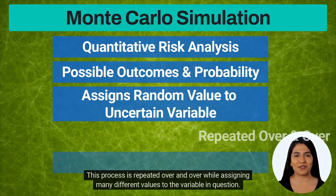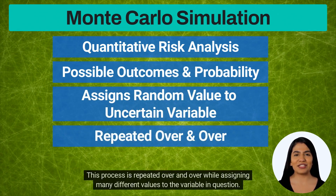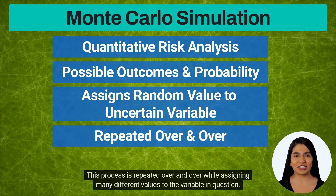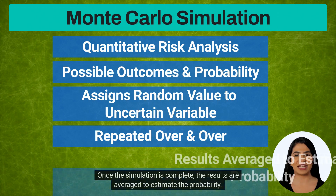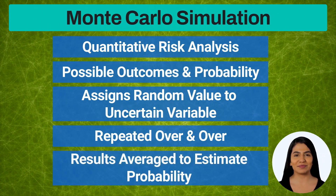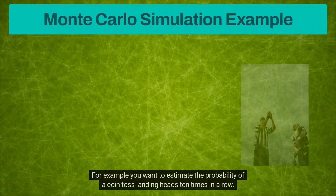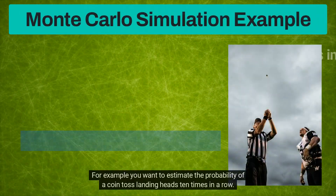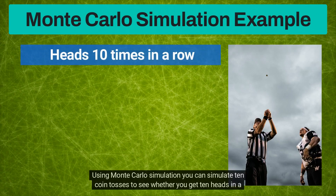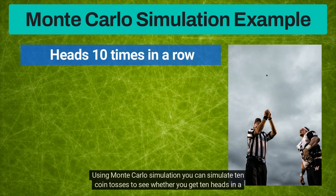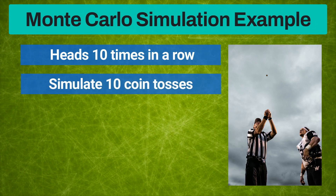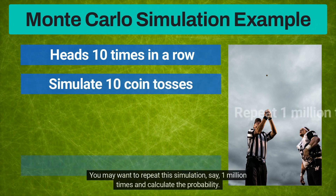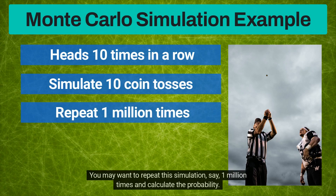This process is repeated over and over while assigning many different values to the variable in question. Once the simulation is complete, the results are averaged to estimate the probability. For example, you want to estimate the probability of a coin toss landing heads 10 times in a row. Using Monte Carlo simulation, you can simulate 10 coin tosses to see whether you get 10 heads in a row. You may want to repeat the simulation 1 million times and calculate the probability.